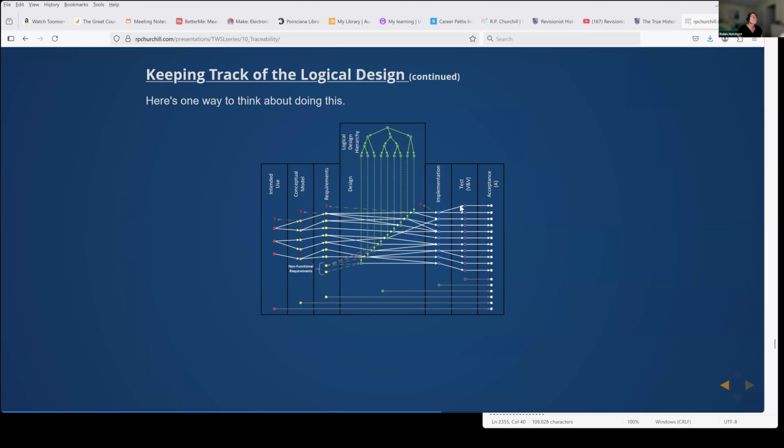but you also of where all the parts fit into the whole. And so that's what this is. If you think of an aircraft, for example, you might have wings, engine, electronics, fuselage, a few other big systems, and then you'll have subsystems, and you'll keep breaking it down. And if you want to do something stupidly complex, like the Apollo program, you break it all down into chunks.